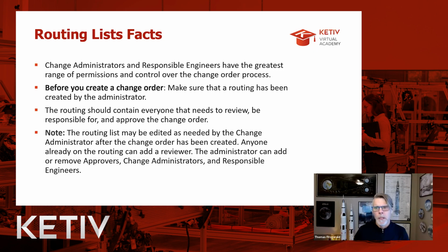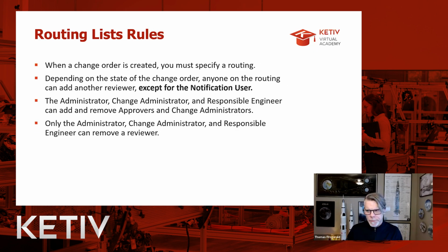All right. So some rules around routing lists before we get into the demonstration. When a change order is created, you have to specify a routing. So that's part of the process. Create the roles and responsibilities, create the routing list, create the change order, and then point to the particular routing list you want to leverage or want to use. And we're going to show that here.